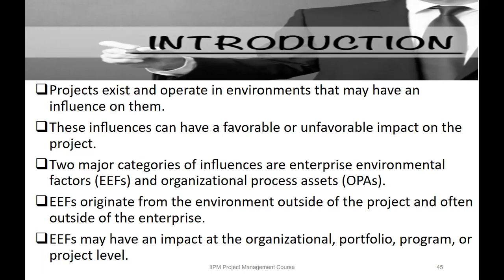I would like us to keep this in mind. The enterprise environmental factors originate from the environment outside of the project, and in most cases also outside of the enterprise. That means EFs are influences beyond the control of the project team, and in most cases beyond the control of the performing organization, and perhaps beyond the control of the contracting organization also.